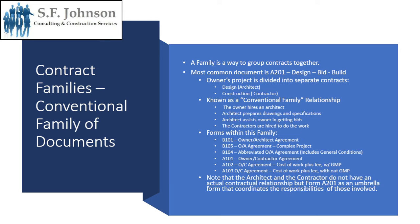The forms within this family are as follows. B101 is the owner-architect agreement. B105 is the owner-architect agreement for a very complex project. B104 is the abbreviated owner-architect agreement, which also includes general conditions. A101 is the owner-contractor agreement. A102 is the owner-contractor agreement with the cost of work, specifically cost of work plus the GMP. And A103 is the owner-contractor agreement with the cost of work and no GMP. It should be noted that there is no direct contractual agreement between the architect and the contractor. To address that, form A201 is an umbrella form that coordinates the responsibilities among all parties, including the architect and the contractors.